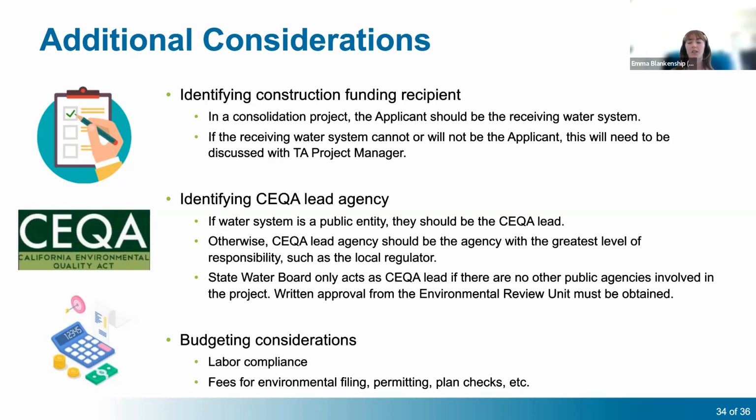Like I mentioned before, labor compliance should be included in the work plan. If you have any surveying or other protected job classifications, that will need to be added as a consultant on the planning project. Also, you might want to consider adding fees for environmental filing, permitting, plan checks, etc. if those aren't covered in the construction agreement.